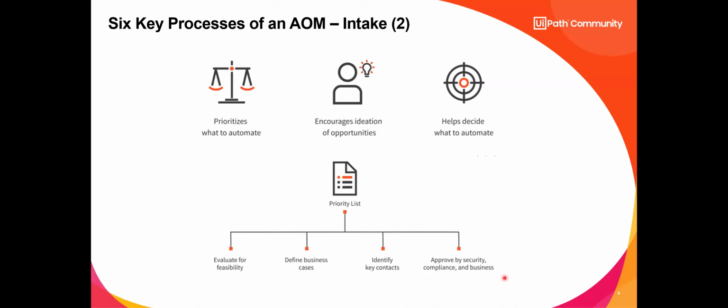They need to know before you go and start automating something. And as you're prioritizing things, you need their input, because something that's a good opportunity may be a bad opportunity when it comes to the systems, the system controls, and security controls. And this happens a lot when you're working in the government sector, where you're building for the federal sector. Something that looks really easy ends up being just a bear because of security.